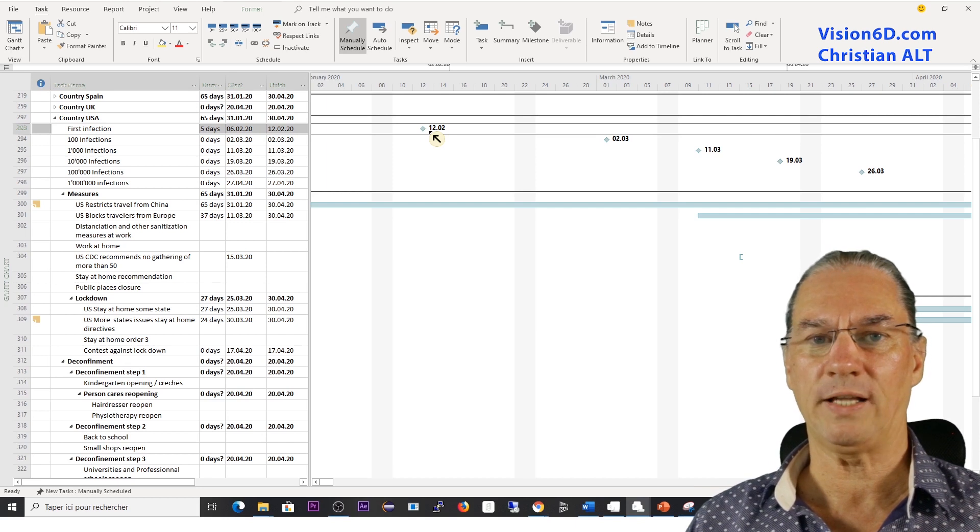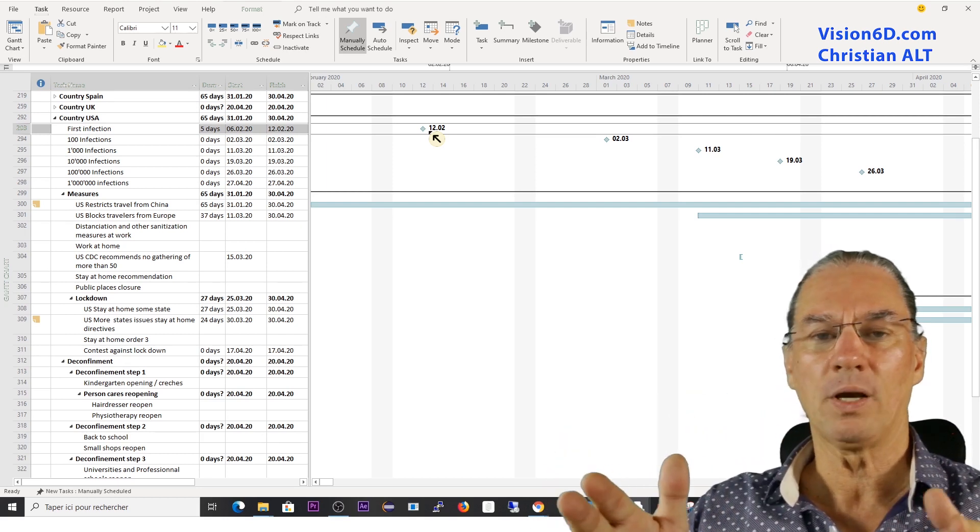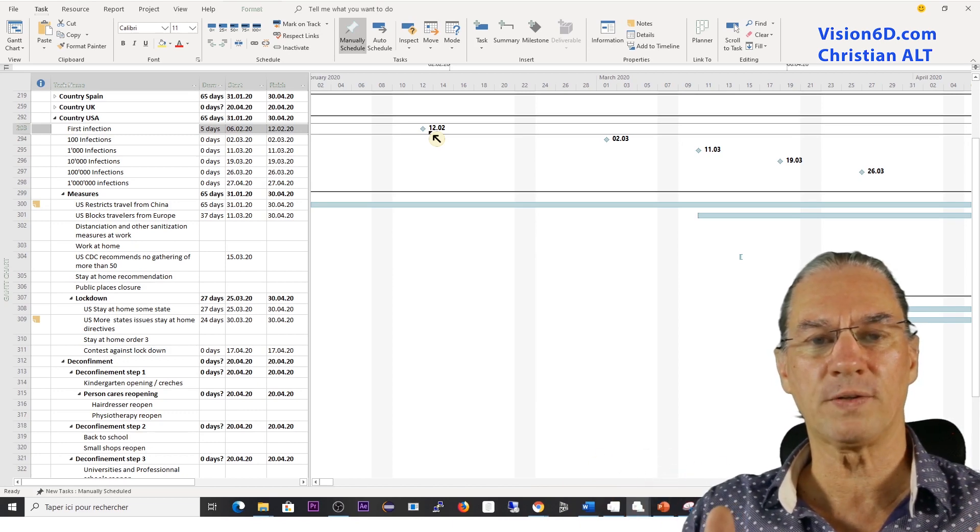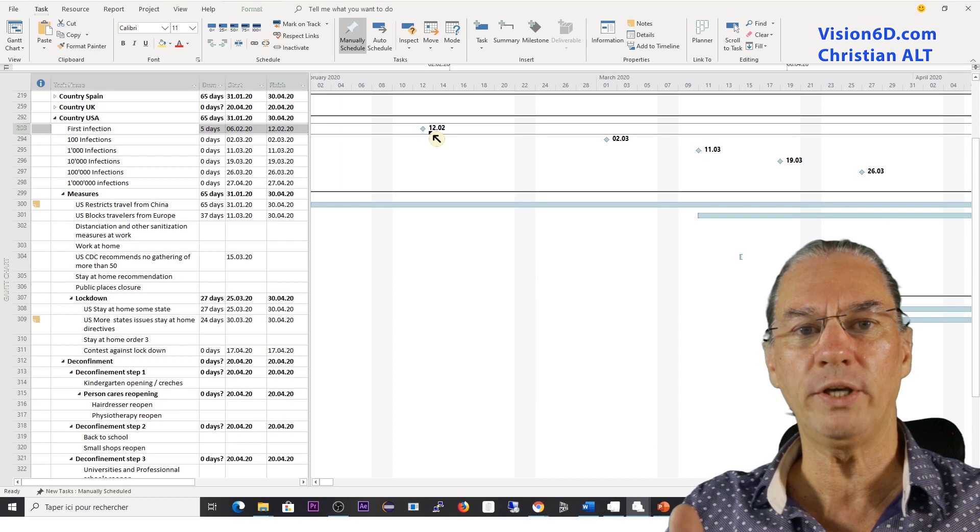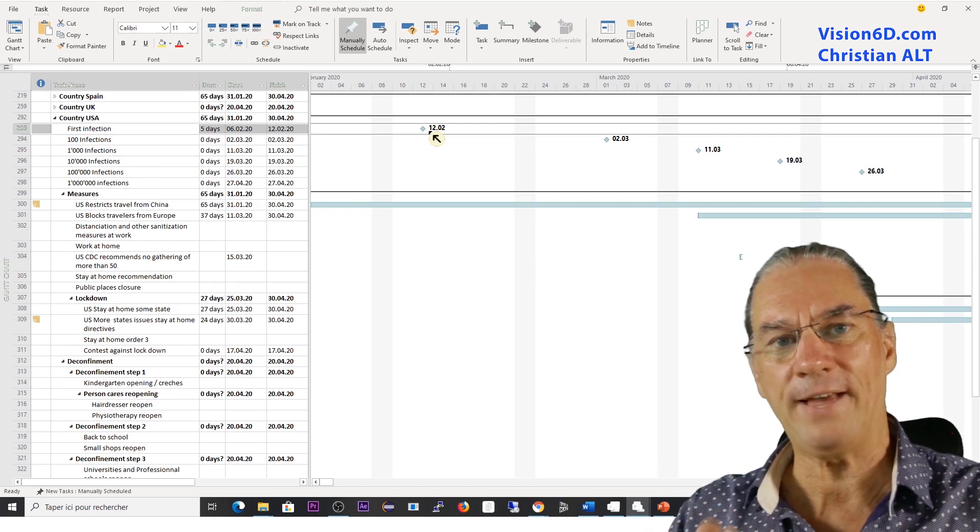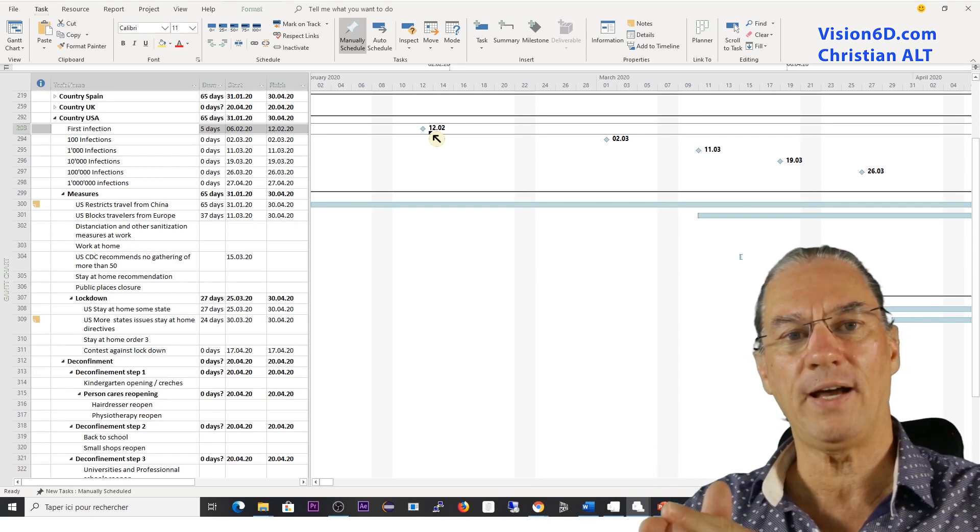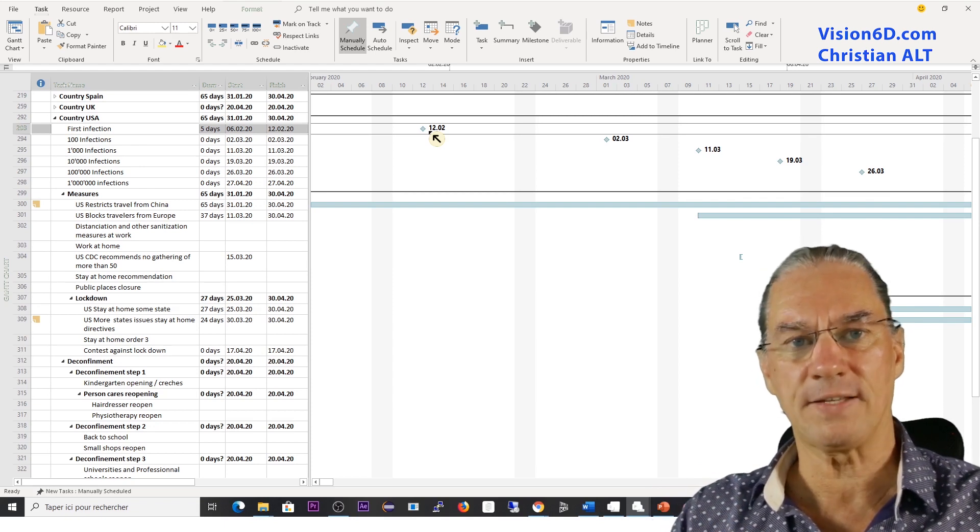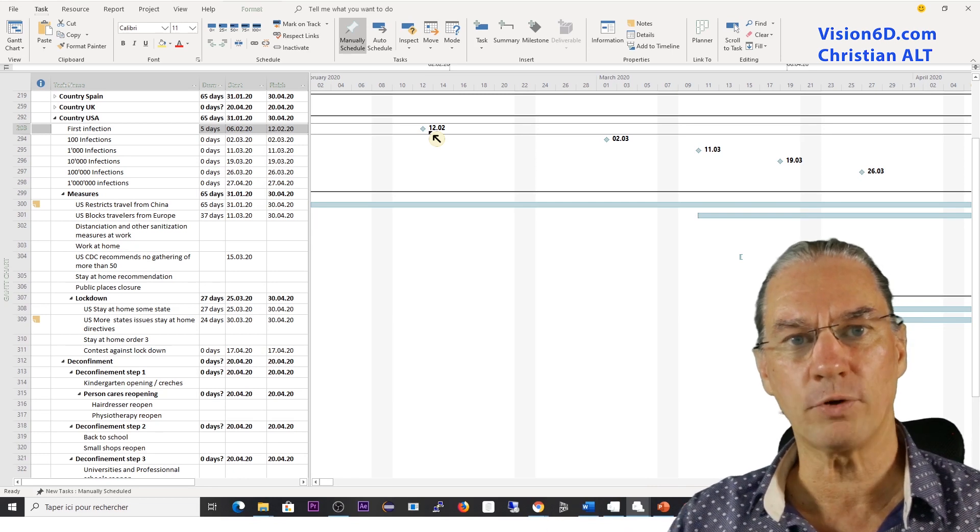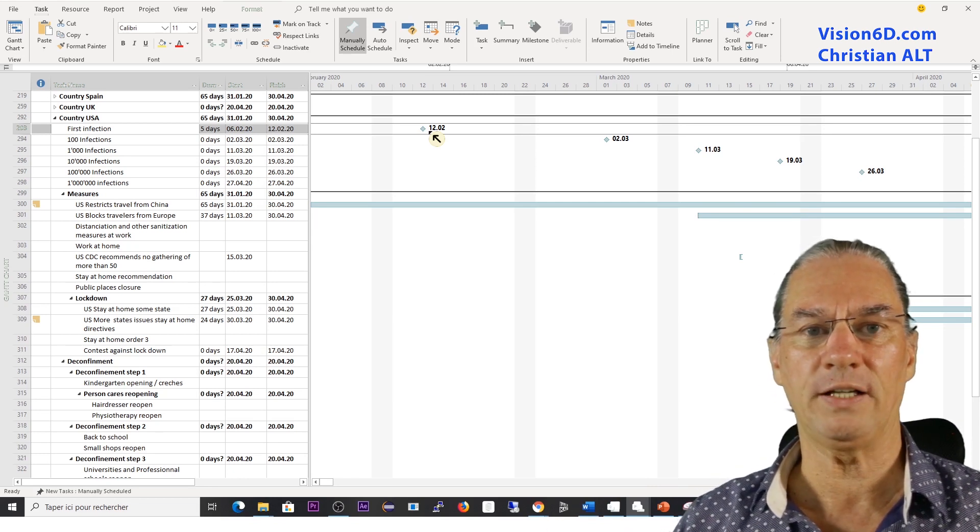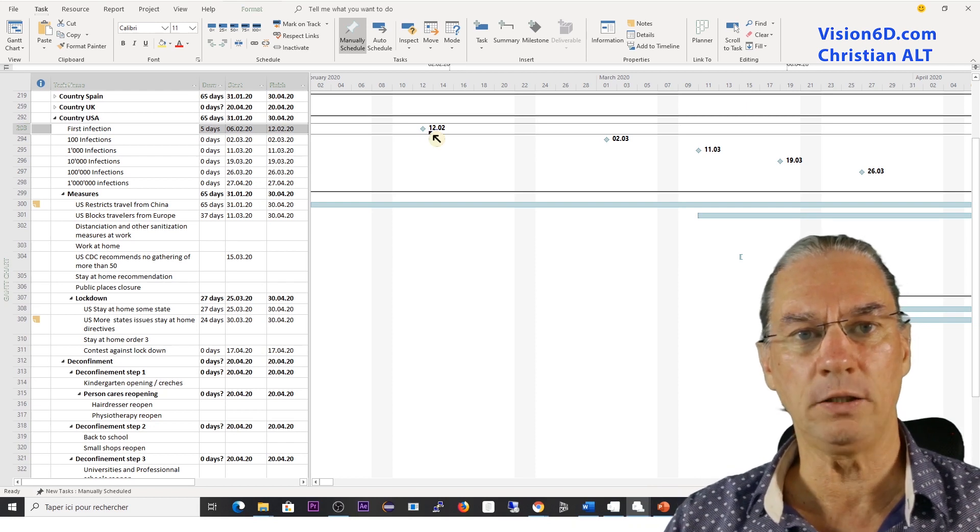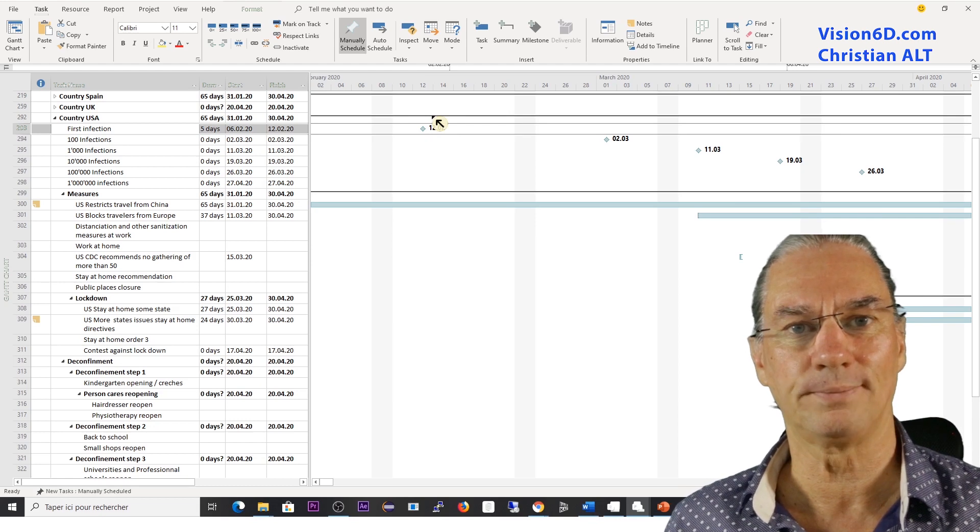So for example, we could take another case. You are performing an analysis of feasibility of a certain project. This lasts, let's say, one week. And what you want to mark on the planning is when the analysis is finished. So you mark this as a milestone. You have then a deliverable, which is maybe the document of the analysis or the analysis result. And you mark this as a milestone.